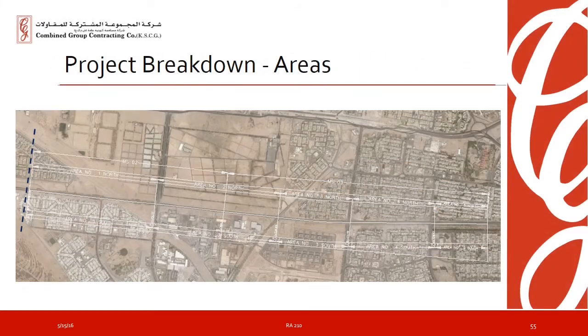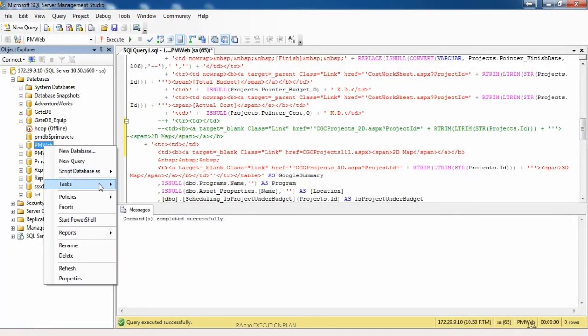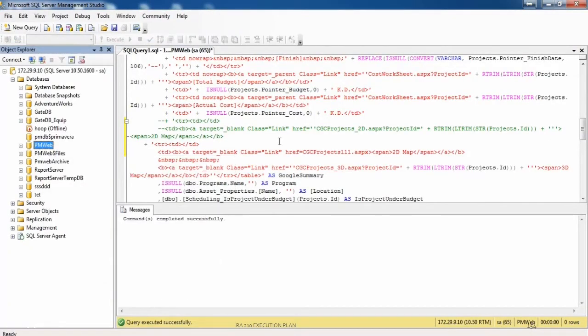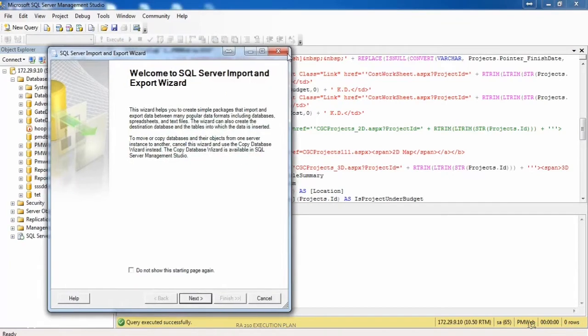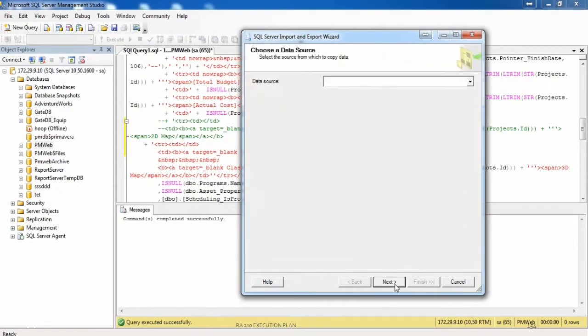So we would take the drawings and break them up into logical areas for milestone 2, milestone 3, and then take that and further break it up into areas. And basically we assign construction activities based on that numbering system. So once the CPM or the schedule of the project has been developed based on a logical numbering system,